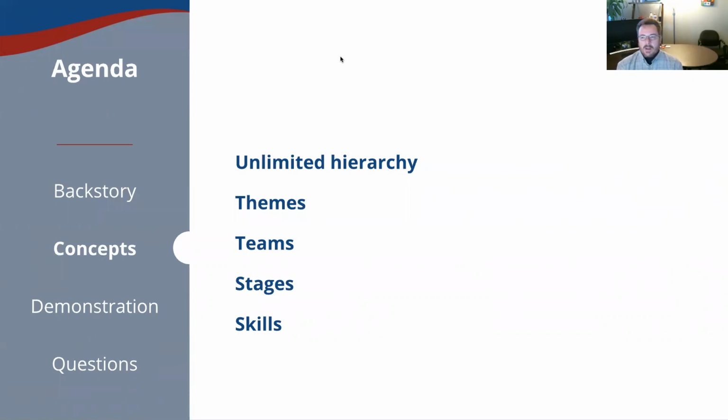This theme field is a field in the database, and it is exposed back in JIRA. And I expect that at any time, and it could be currently, I just haven't looked deeply at the latest version. But for right now, we're recommending to our clients that these themes and the other fields that are available in Portfolio that are being exposed in JIRA only be edited within Portfolio. And we'll go over that a little bit more.